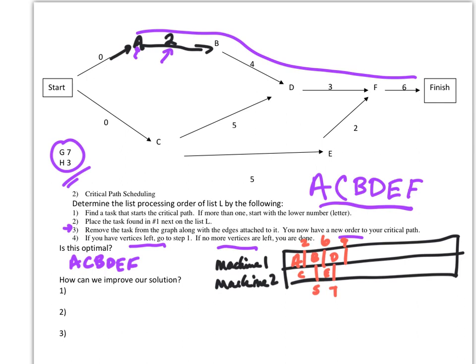So down here, I started placing these in this order. So I placed A, I placed B, then, I'm sorry, I placed A, then C. And I could do that on separate machines because there is not a prerequisite for this C. But then B has a prerequisite of A, so I could start that right after that on machine one. And then D has a prerequisite of B, so I started that right after B got done. E doesn't have a prerequisite besides C, so I could put that right after C on machine two. Now F, where am I going to place F? Well, what makes most sense? Well, the earliest that I can start it. Well, in all actuality, it doesn't matter which one I'm picking. I could put it on machine two, and this is going to be a total of six. But here I'm up to nine. And so then this would be 15. Ooh, that turns out to be our optimal solution. I do have a gap here of downtime. So maybe you're retooling a machine or whatever you have to do, but there is downtime that we do end up with this.